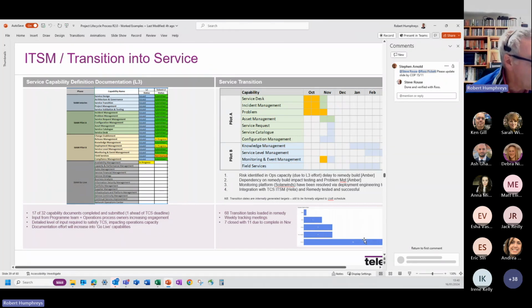But, once again, we need to make sure that, if service should have been completed, the service design is part of the delivery, then we need to make sure that that's being covered and fully visible as we go through each of the stages. And that's what this is about, making sure that we're not suddenly blindsided by the need to put a service design together when we've already completed the technical design, we're out in test, and all of a sudden we're trying to work out how we're going to support this service going forward. So trying to make sure that the right things are being done by the right time by the right people, and this is a way of demonstrating that that's happening.